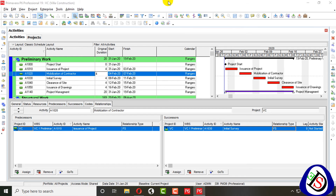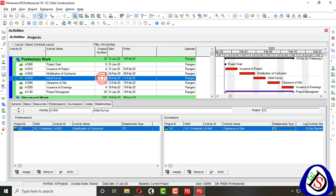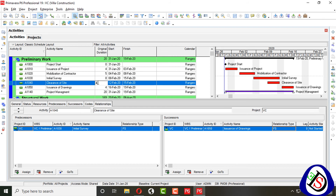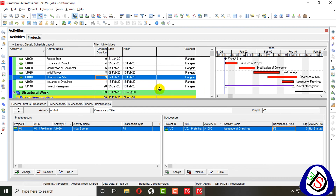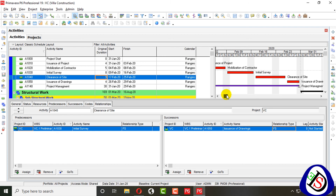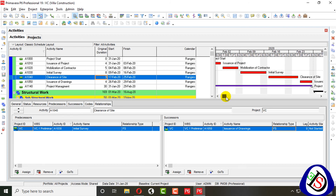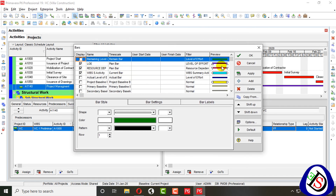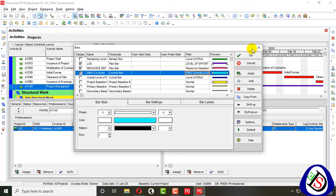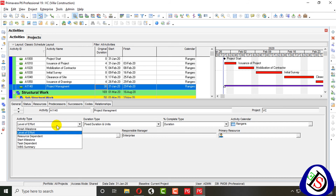Level of Effort is useful when you don't know the duration of your activity — it automatically calculates based on your project. When I change the duration to five days, then eight days, then nine days after receiving my BOQ, and schedule again, you can see it changes to 30 days. Level of Effort is applied to project management activities and plans where you don't know the actual duration.